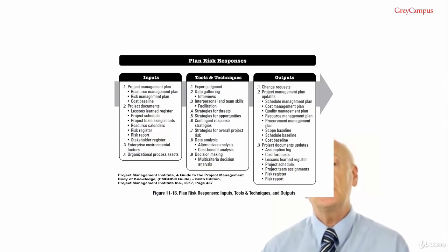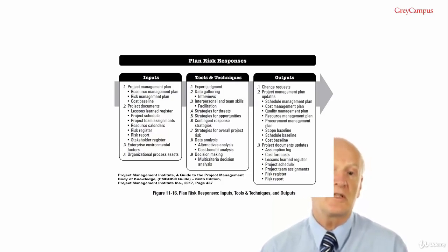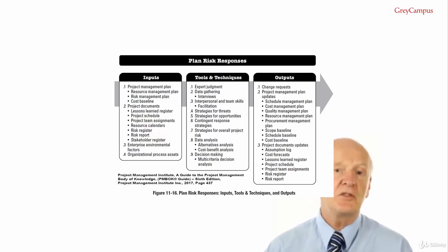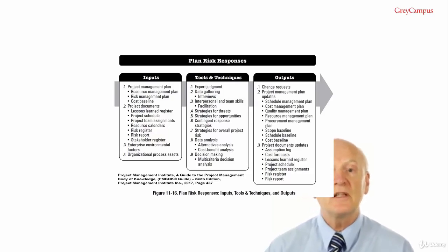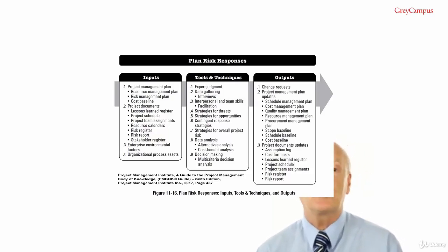The trick is also to transfer to an entity that is outside the commissioning organisation. Where my students usually get it wrong is they say something like, our team does not have the necessary skills for a major task, and so we transfer the risk to a more experienced team. Or we can transfer this risk by employing an expert.